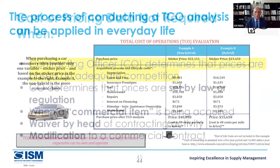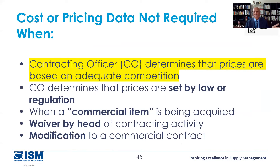Cost data versus price: if you feel cost data is needed, it is time-consuming, so I won't encourage going into cost data if there is enough competition. When prices are set by law or regulation, it's not needed. If it's a commercial item, I have catalogs and e-commerce comparisons. But for very large projects — $30 million, $40 million, $70 million — costing was massive. For CapEx like transmission towers and cables, we could do the costing — steel tons, labor cost, risk cost — complete cost was given to us. We could compare with the market and link copper rates with the London Metal Exchange.